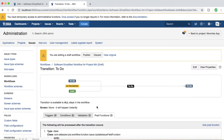The last component in the advanced Jira workflow configuration is the transition screen — the screen that pops up when an issue transitions from one status to another. For example, if you are moving an issue from To Do to In Progress and you have a transition screen set up, it will pop up a screen. You can also add validation on that screen to verify that the person moving the issue has completed all the relevant information required as a prerequisite before moving it.